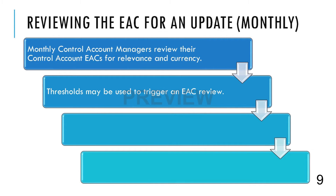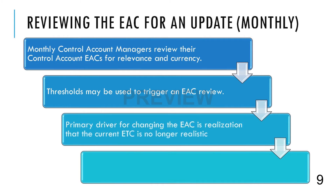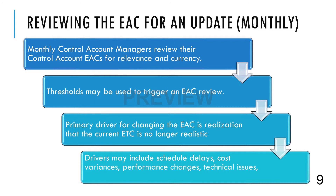The CAM knows the day-to-day issues and is in the best position to identify non-recurring and recurring cost impacts. This information assists the CAM in determining if the EAC needs to be updated, and if so, by how much. The primary driver for changing the forecast of costs is realization that the current ETC is no longer realistic nor consistent with the remaining work. Drivers which may cause a need to change the EAC include schedule delays, cumulative cost variances, changes in performance, technical performance issues, and realized risks.